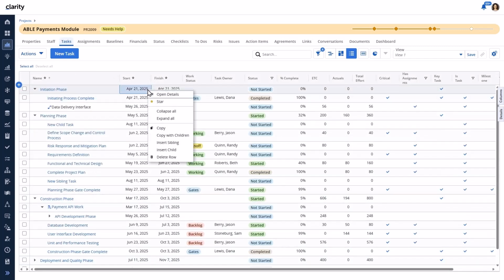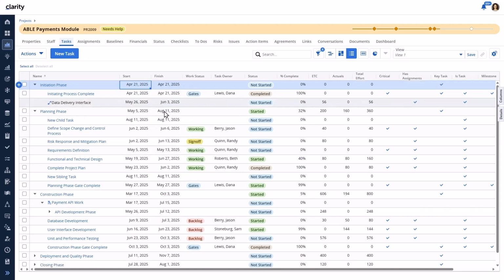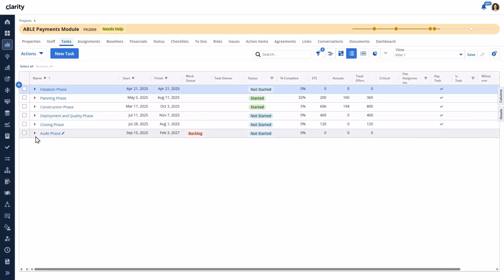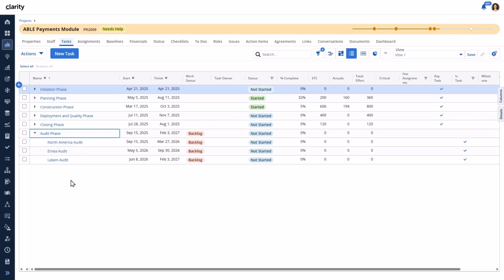Collapsing all levels of the WBS, the newly added tasks copied from the other investment have been added to the bottom of our plan. The ability to filter and have parent tasks returned is very exciting. When you filter your tasks, the expandable tree ensures you always maintain context, automatically returning the parent tasks so you'll never lose sight of the bigger picture. For this demo, I'll filter for milestone tasks.